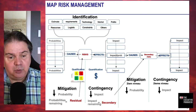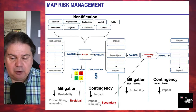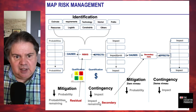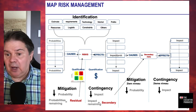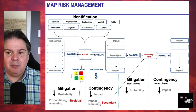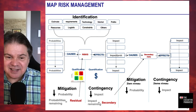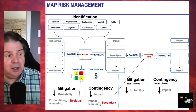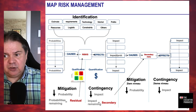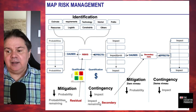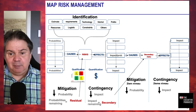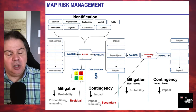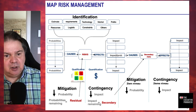We do a lot of activity to minimize the probability, but there's still a residual. Looking at the residual, we consider the effects it can have. For example, the battery effect: I'm losing time, people are getting upset, the schedule is disrupted. I need to reduce that. So I put together a plan B — a plan I will execute only if the issue occurs. I'm not going to figure out what to do when the issue arrives; I already have a plan. If the issue is there, I swap the battery.